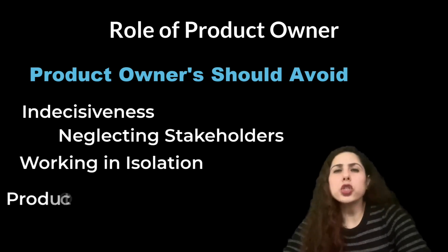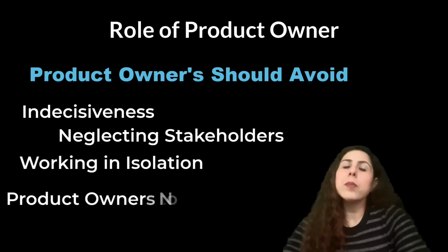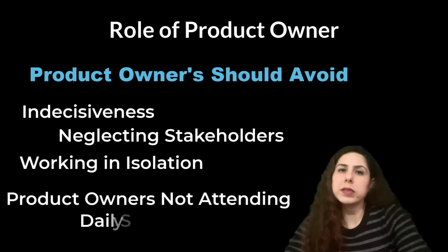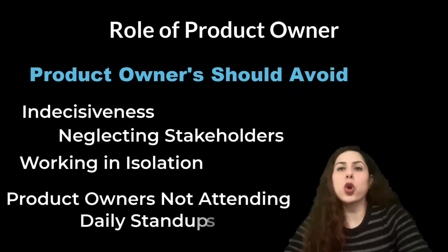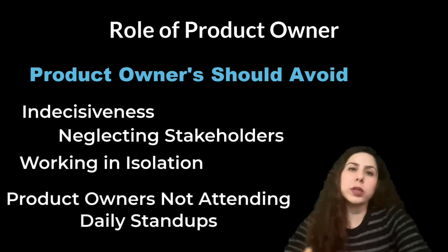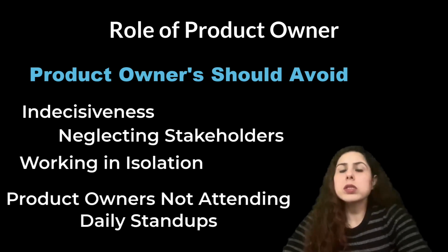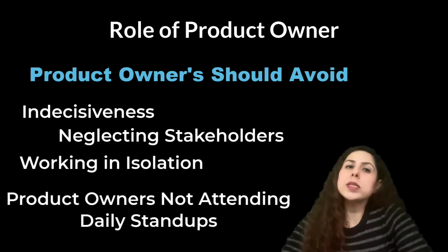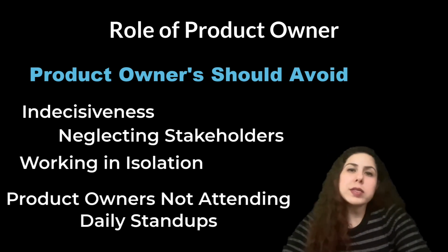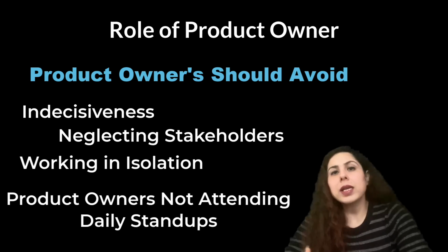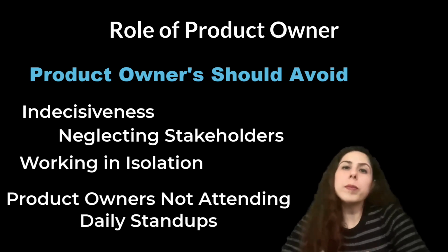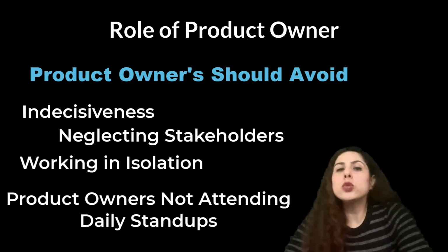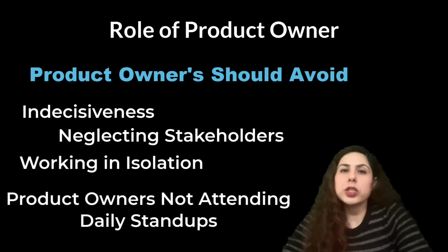Additionally, a common issue in many organizations is product owners not participating in daily stand-up meetings, which can hinder the product's progress and overall quality. When product owners don't attend these meetings, they miss the opportunity to stay updated on the team's progress and provide timely clarifications or adjustments to the backlog. This lack of involvement can again lead to delays and miscommunication.